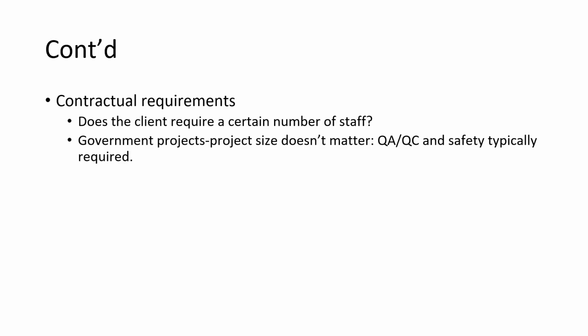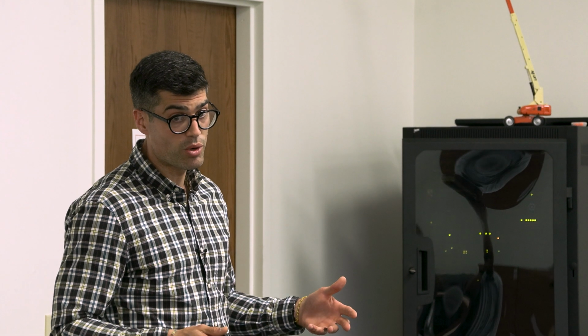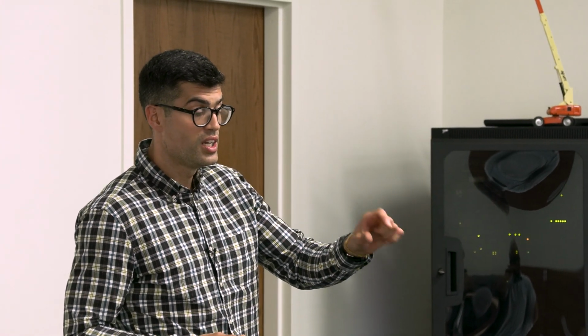We talked about contractual requirements. Obviously, does the client require a certain number of staff? Do they require QA, QC certification? Depending on your job and your understanding of your scope of work, that's what's going to be required. And that then requires you to put a whole other person that meets a certain set of qualifications. And then the question is, can you find that person?